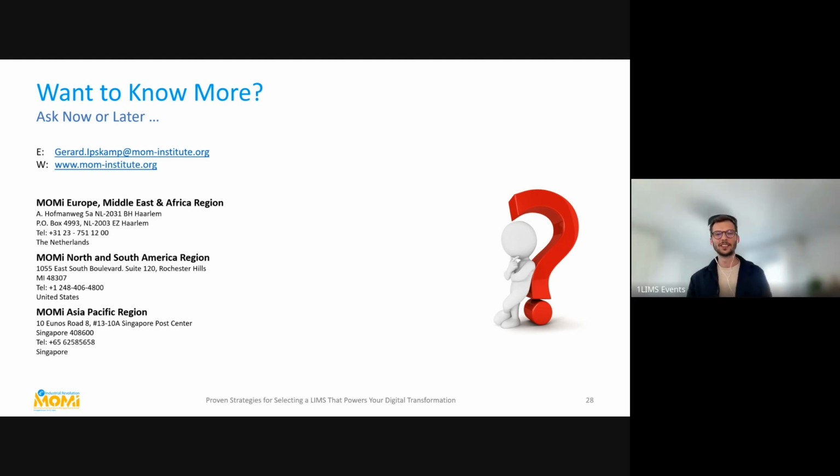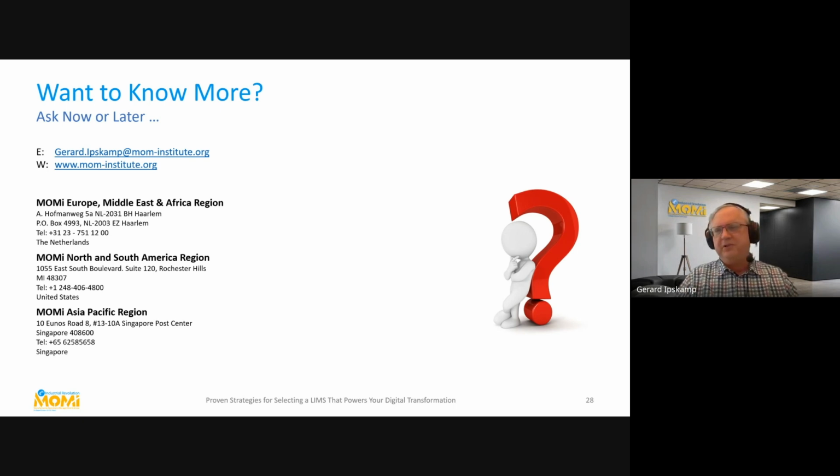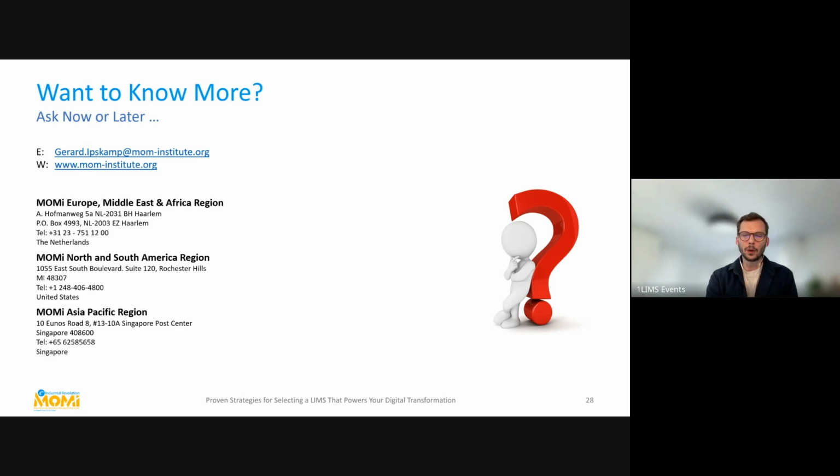Yeah, true. It's just to review the current state. Yeah, the new current state after 6 months of being live, then look at the new current state and see if you missed something. And most of the time they miss something somewhere. An equipment that was promised, or an interface that was promised and not implemented, or something like that. So yeah, I recommend it. Good. Yeah, we also do this at every LIMS implementation project.